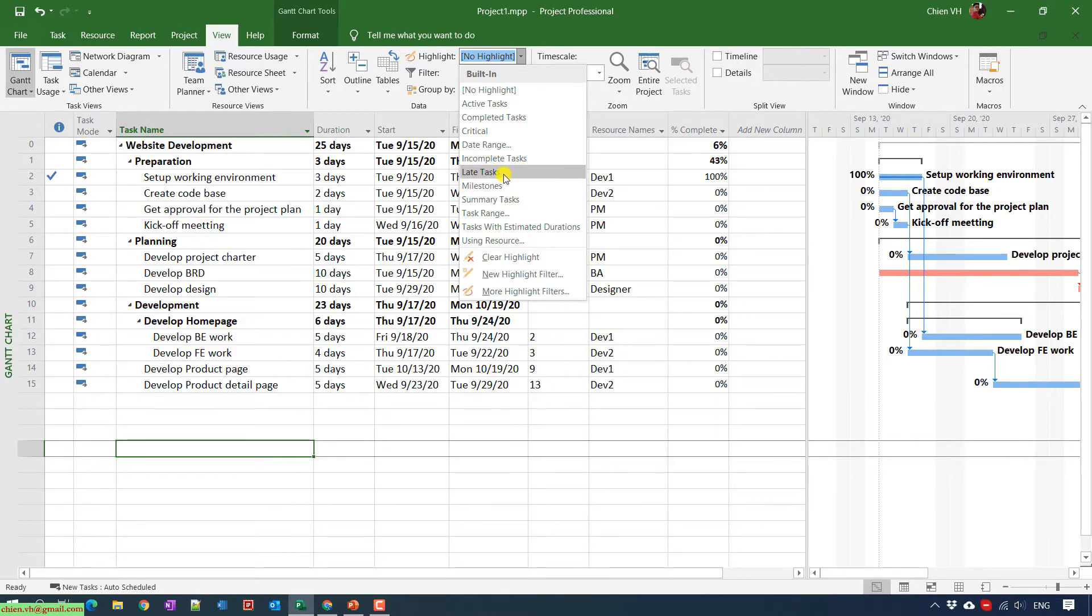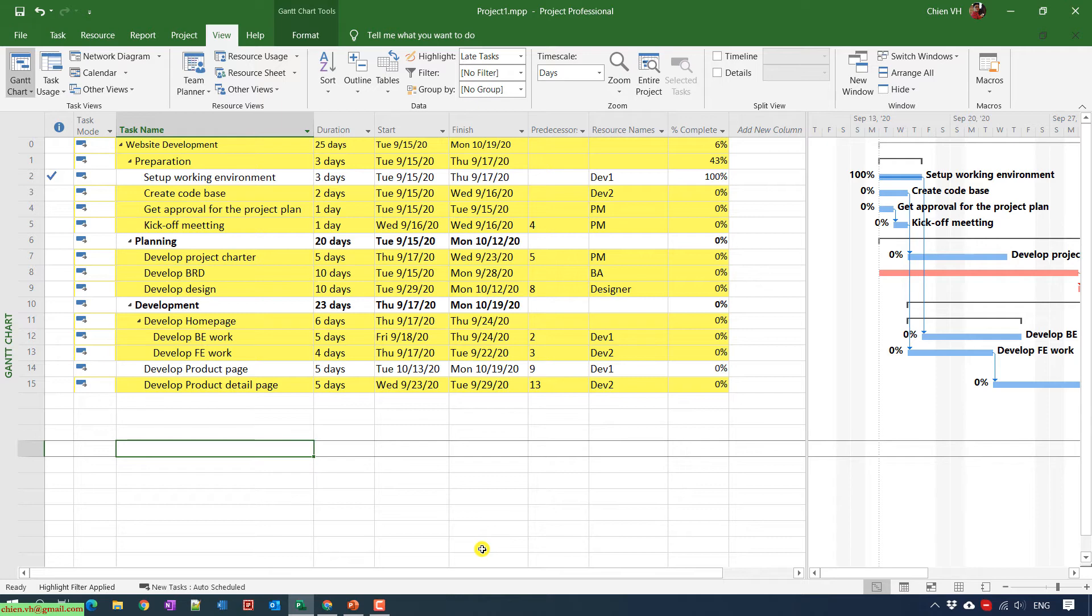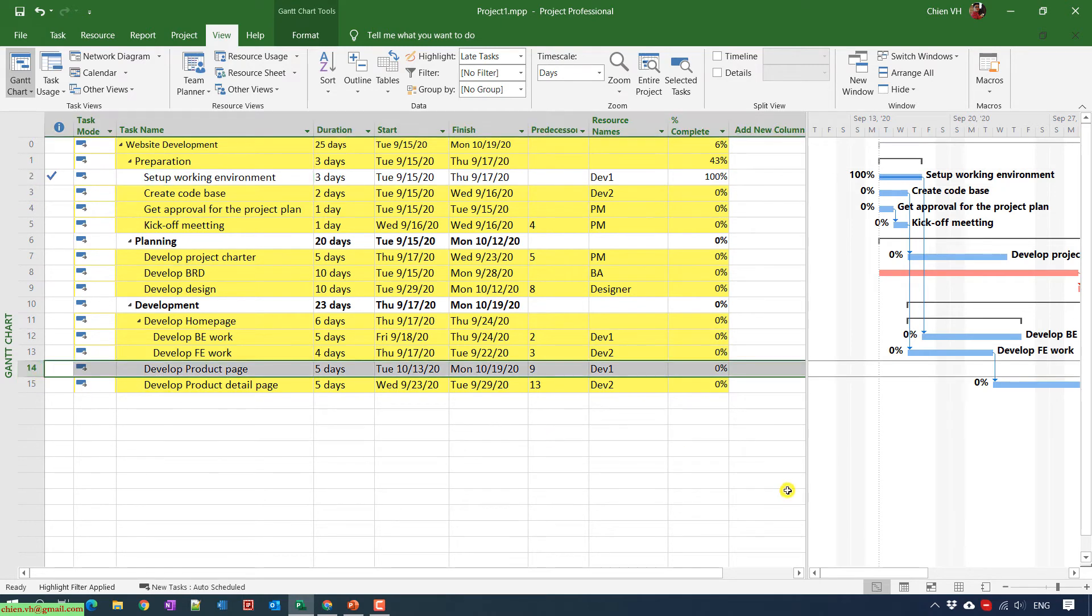After you select the highlight for the late tasks, it will highlight all of the tasks that are behind the schedule in yellow color. For other tasks in white color, that means they are not late tasks or they are completed or still not behind the schedule.